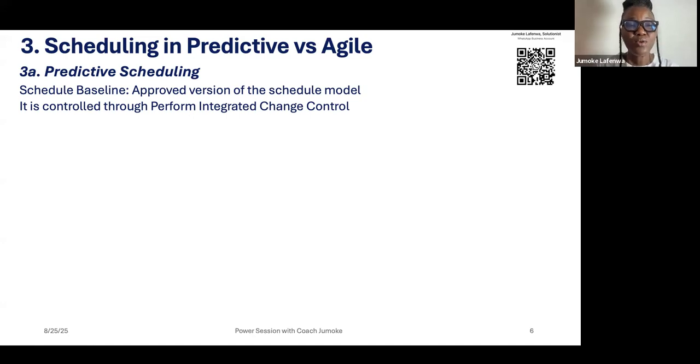Okay, so that is the only way. So when you have a question that is talking about a change request was made, ensure that you investigate and estimate the impact before presenting it to the change control board before it is accepted. Once it is accepted, you will now update all the corresponding documents. So you don't just accept without going through this process.